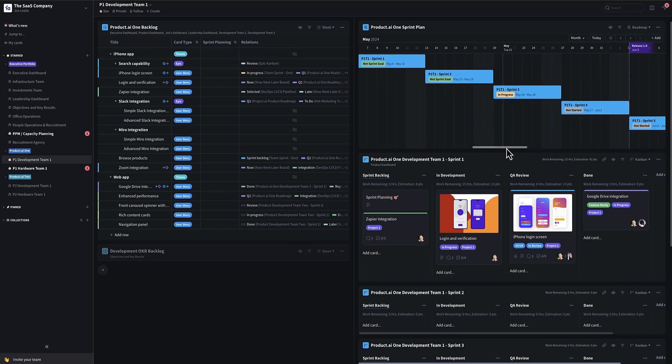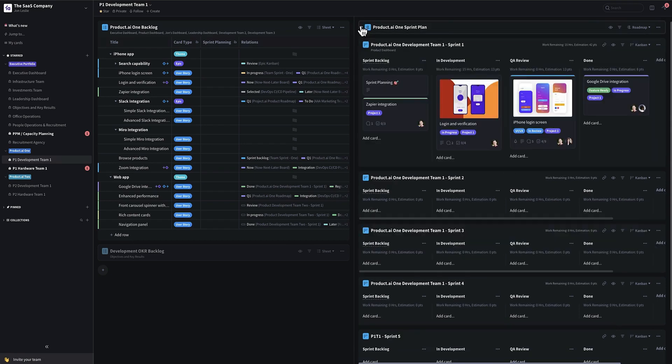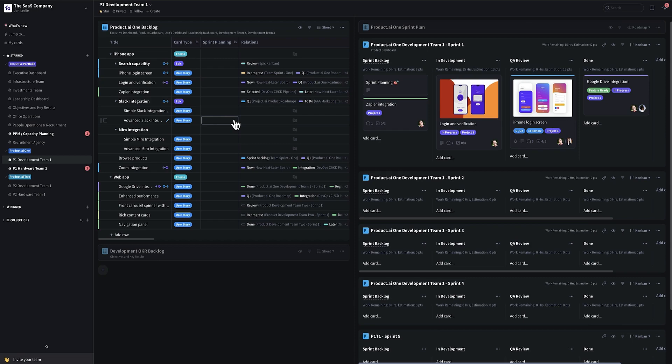Now, to do sprint planning out into the future, of course, you don't want to plan too far in the future, depending on how agile you are. But to do some kind of sprint look ahead can always be nice. And here, for example, I might want to, from the backlog, plan out into the future a little bit, do some resource allocation at the velocity and maybe work remaining level if I'm breaking things into tasks on the cards in advance and giving them work remaining estimates.